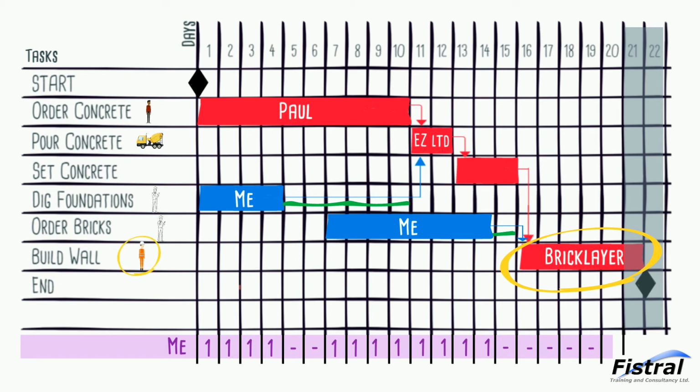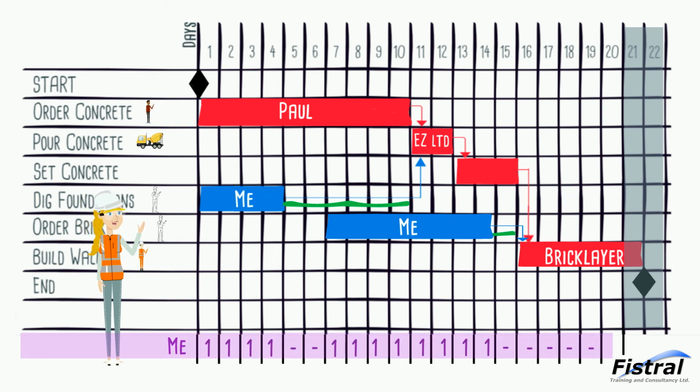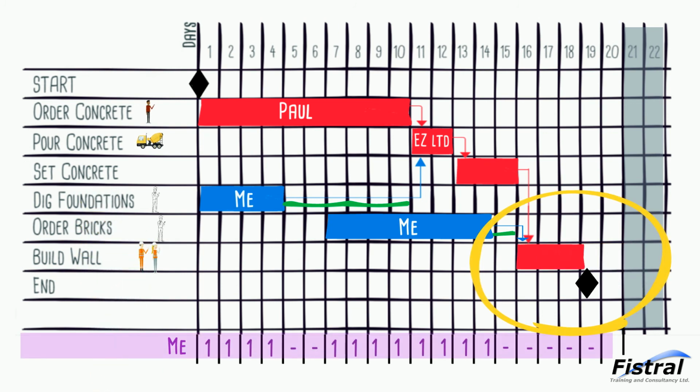At the moment, this is being performed by a single bricklayer. So what I do is I go to the bricklaying team and ask if they could assign a second resource to help out on that task. This now means we can finish the activity earlier and get inside the timeline with a few days to spare. If they can't spare another resource, then we can objectively explain to the boss why it's not possible to finish the project in time. It's evidence-based planning.